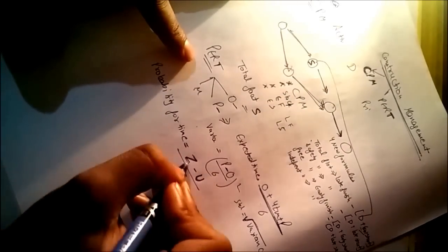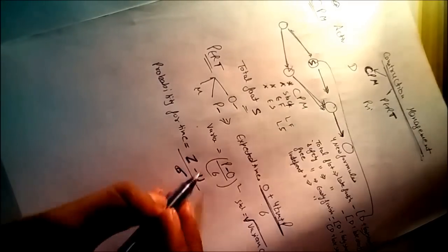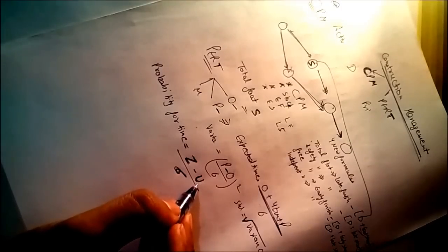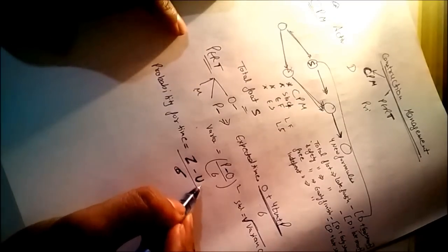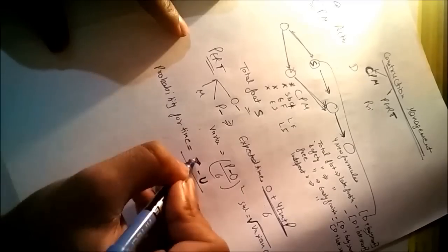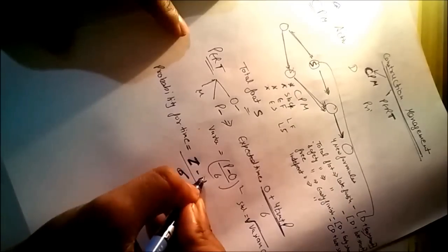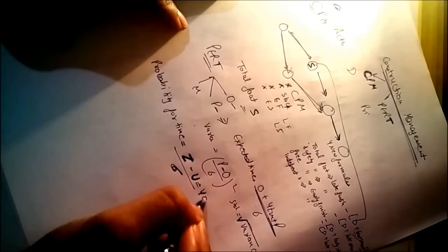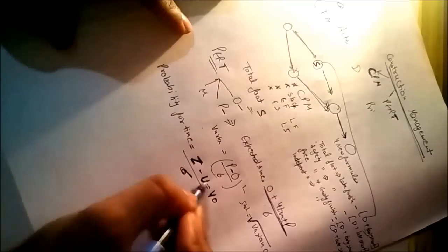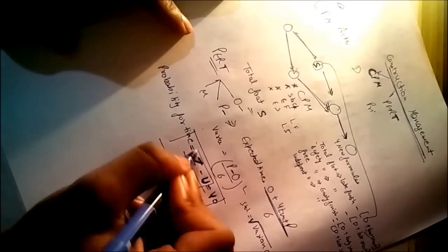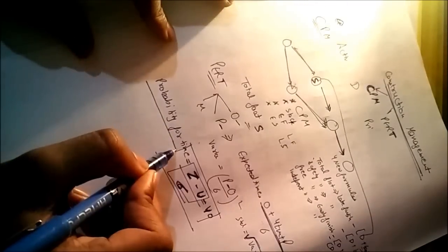In the question it may be given that the expected time is this, and you have to find the probability for a given time. For example, they say 40 years, find out the probability to be completed in 40 years. So we will use this formula, z equals x minus u upon standard deviation. This is the formula for probability for time.